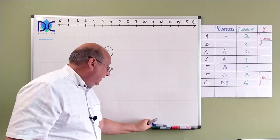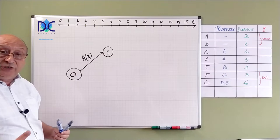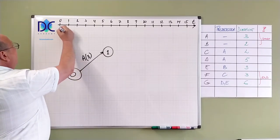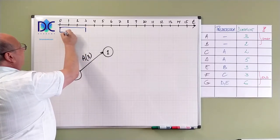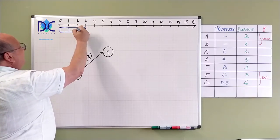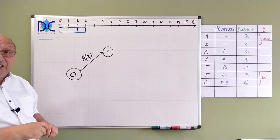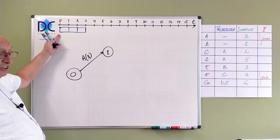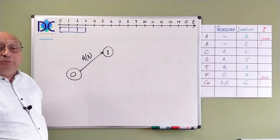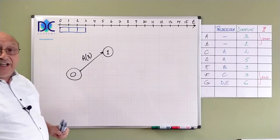And when I draw that on the time scale, here we have the time scale, which is a continuous time scale. I can draw A, we start at point zero and we end at point three. So basically we have three periods, a duration of three periods for activity A. We start at time zero, we end at the time three. It's like you use a chronometer. It starts from zero. When we reach three, that's the end point of activity A.